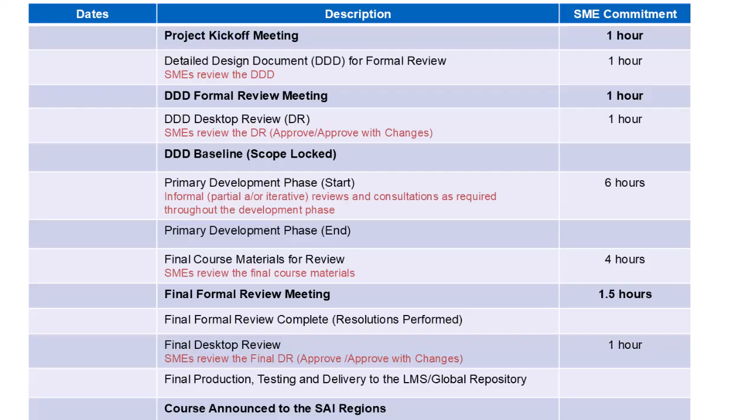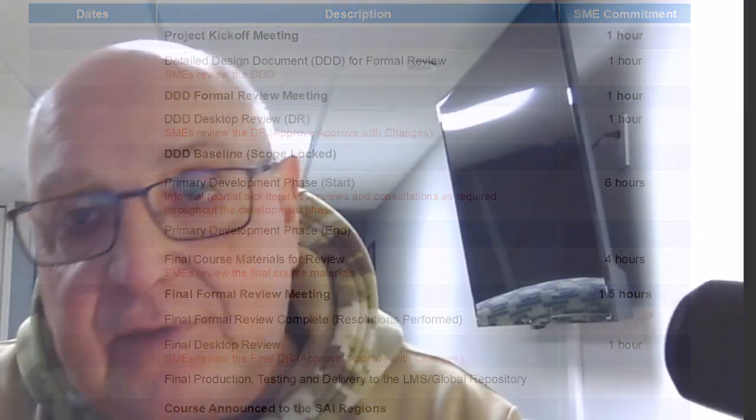And that's the other thing that's important. Before you do any of your reviews, we created feedback sheets. And feedback sheets are nothing more than a spreadsheet. If it was a video that they're watching, so let's say you're using Camtasia to create some online training, you would tell them, okay, mark down what module it was in and what time on the video the comment is. And that became very easy to track because they would watch the video.